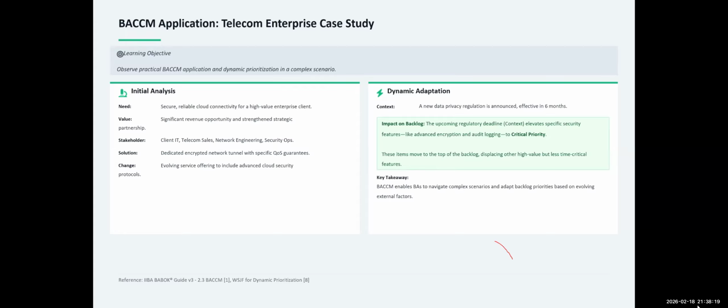So when someone says we are done with this particular feature, it means, has it been tested? Has it been evaluated? Some people might deploy and pilot that particular feature. Has this been validated by a tester? Have you completed regression testing? Have you documented all APIs, documents, user guide for that particular feature? Have you done a security scan, etc.?